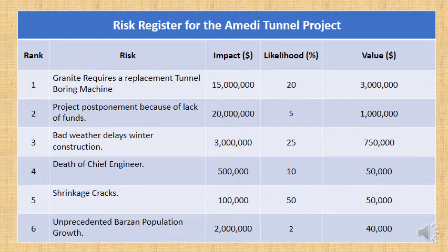So the impact of a delay of maybe 1 year would be $20 million. Now, the likelihood of that happening is 5%. Potentially, you want to reassess that later. I would say, looking at the history of projects in the KRG from the Ministry of Transport, projects being postponed because of a lack of funds happens on a very regular basis. I would say the likelihood is 50% or higher. But anyway, let's say it's 5%, so the value of that risk is 1 million.